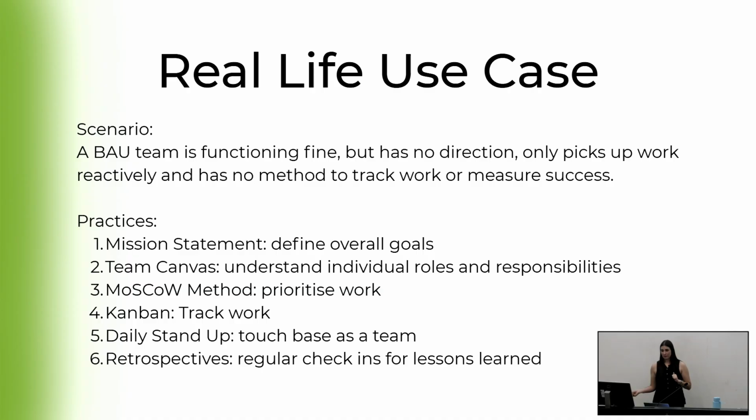Next up, as I said before, we had no way to track our work. I didn't know what the person next to me was doing in their day-to-day. We were both a bit siloed, a bit tunnel vision, just doing our own thing. So we created a Kanban in a shared space that we could all access easily. For those who don't know, I feel like Kanban is just everywhere these days, but you have your backlog, your in-progress tasks and your completed tasks at a very simple level.